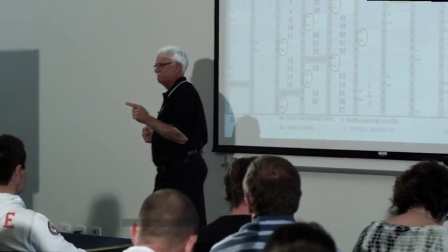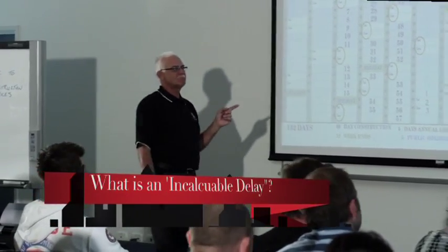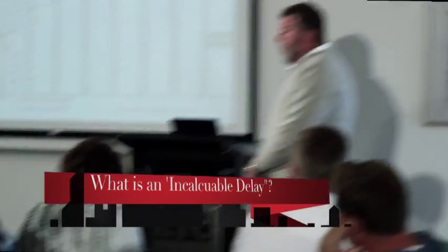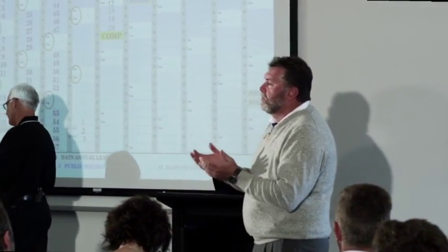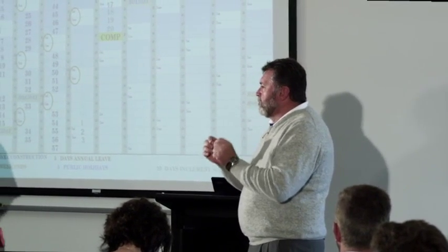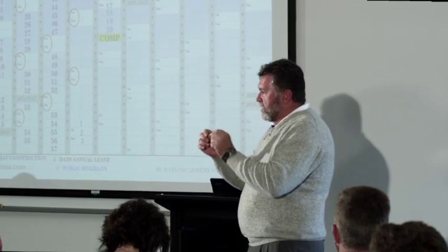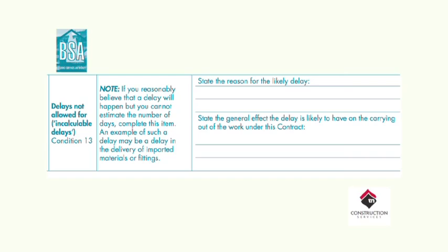Incalculable delays. I'll give you an example. Patrick's decided to have a strike tomorrow for 3 months. You can't determine that. That's what I'm saying. If you have a look at the part in the contract where it says incalculable delays, it actually says state a reason why. It doesn't say there that you have to put days.